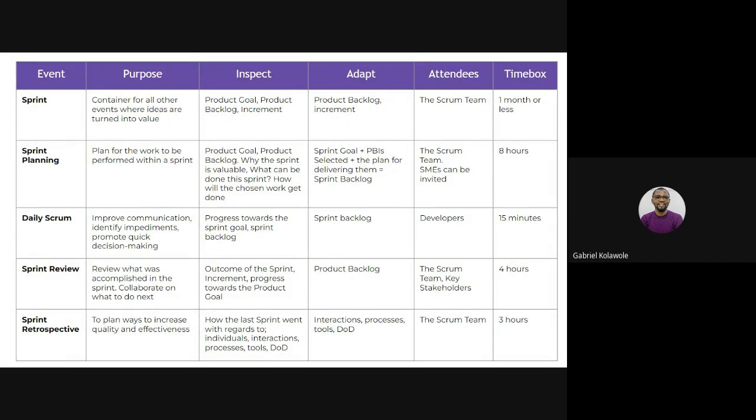people to be able to get at least basic information on the landing page. That is where we want to start. Then they will prioritize or write the user story such that getting basic information on the landing page will be the first item on the product backlog. So when we get to sprint planning next, I'll connect this with sprint planning. So that is one of the things that would be checked when you want to start your sprint. Increments would also be checked.